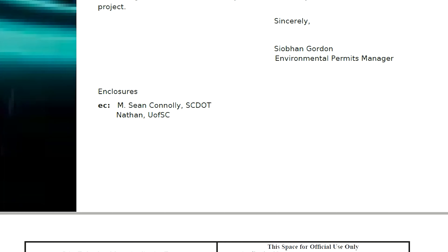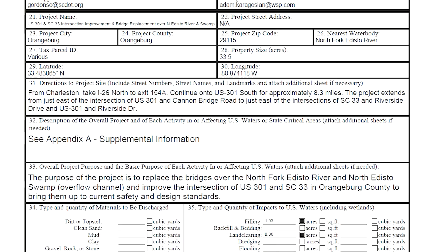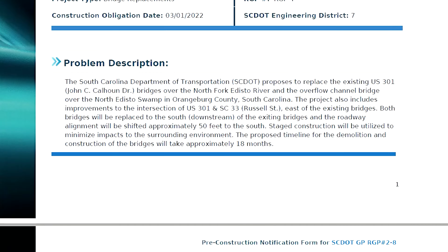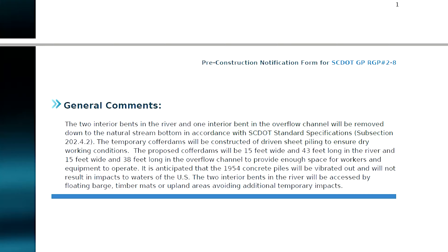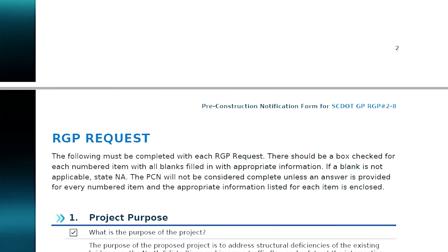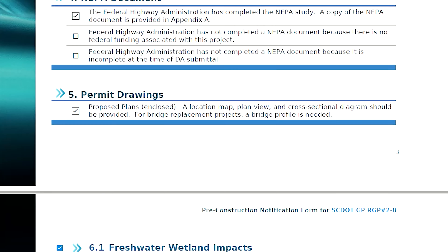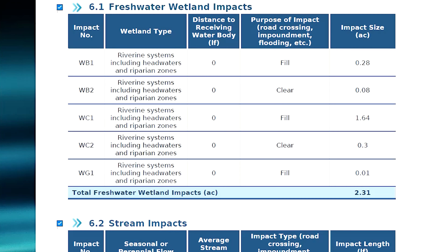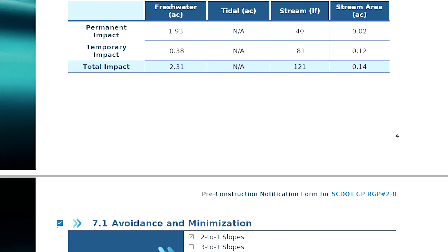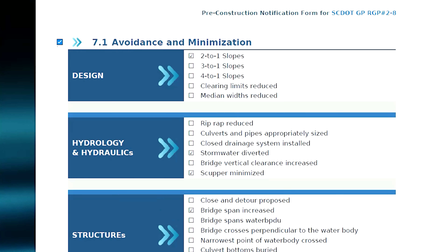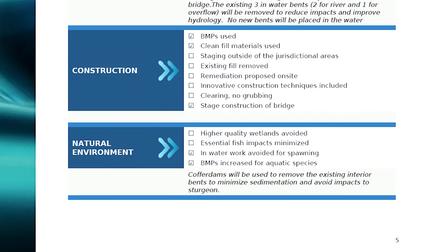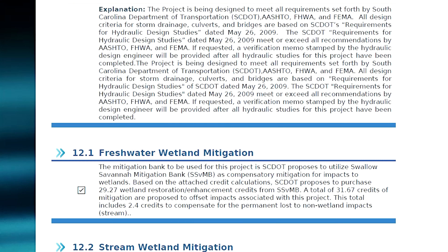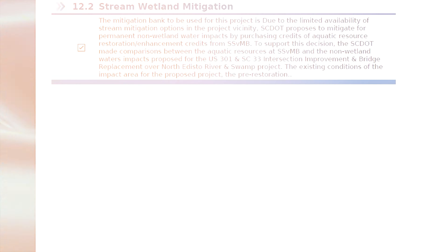Previously, it would take between 15 to 20 hours to gather, document, and format all necessary information for a general permit. Using e-permit, a GP now takes an hour or less and provides consistently formatted submittals for expedited USACE review and approval.